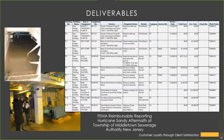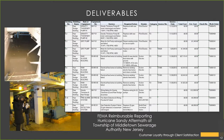Deliverables are the last component. One example is from Hurricane Sandy in New Jersey — Middletown Township Sewage Authority used their existing asset management plan to track all repairs happening in their treatment plant facility and out on their collection system. Although their sub-floor area was filled with water, they kept their web-based GIS running and tracked all equipment being repaired. The report was groomed to FEMA's satisfaction to get reimbursables.